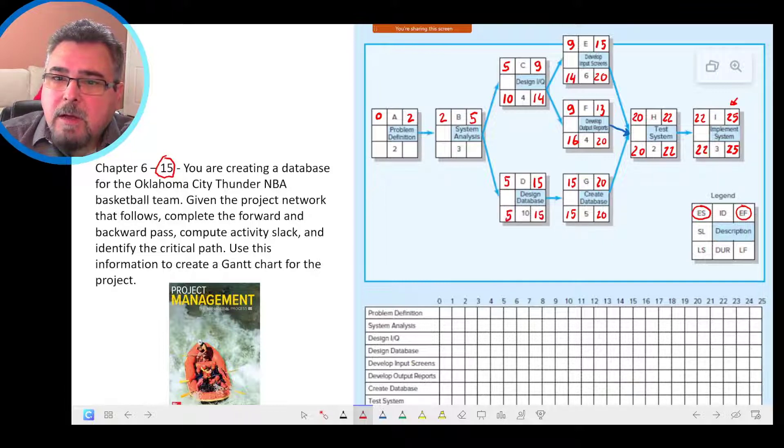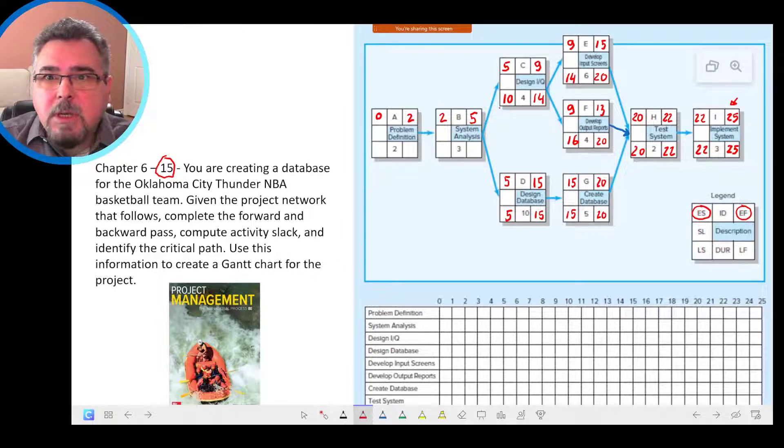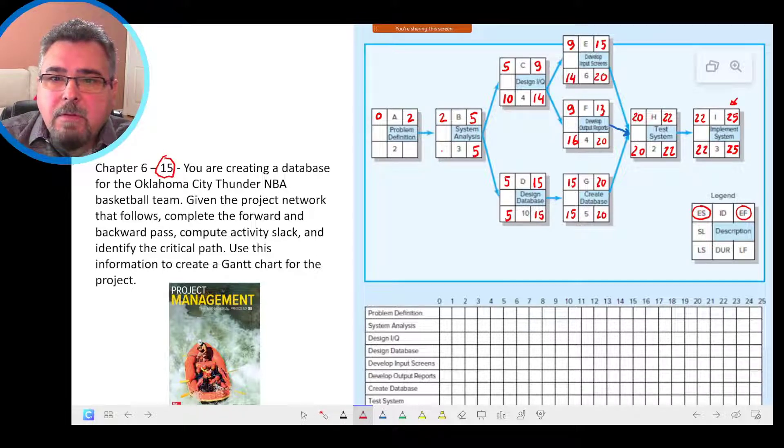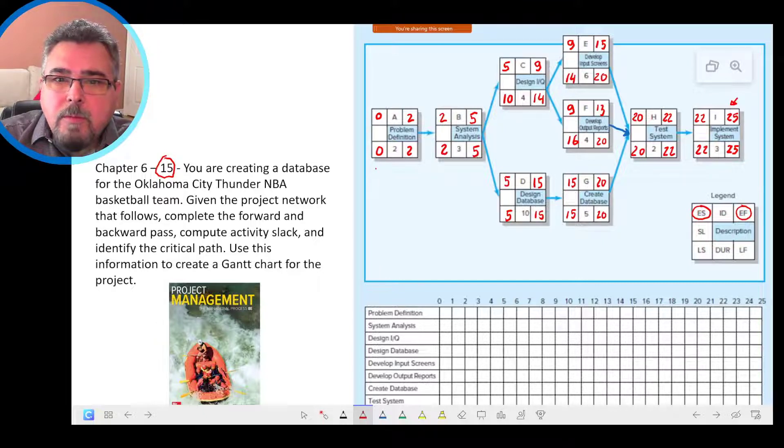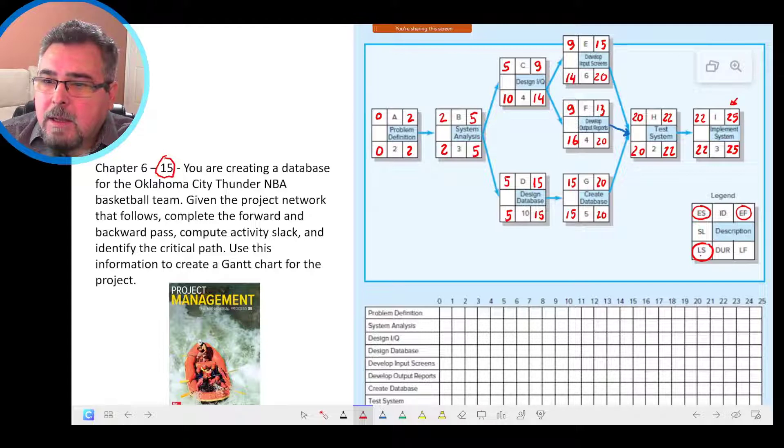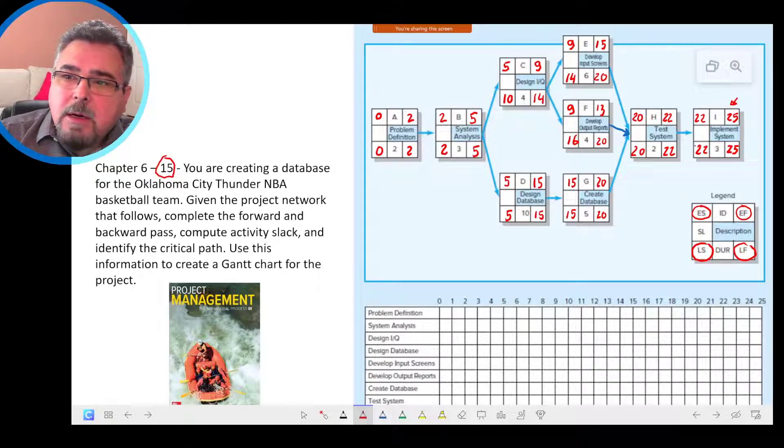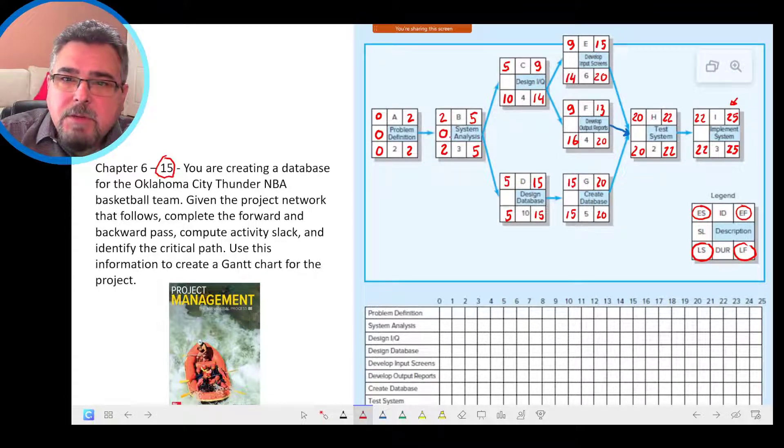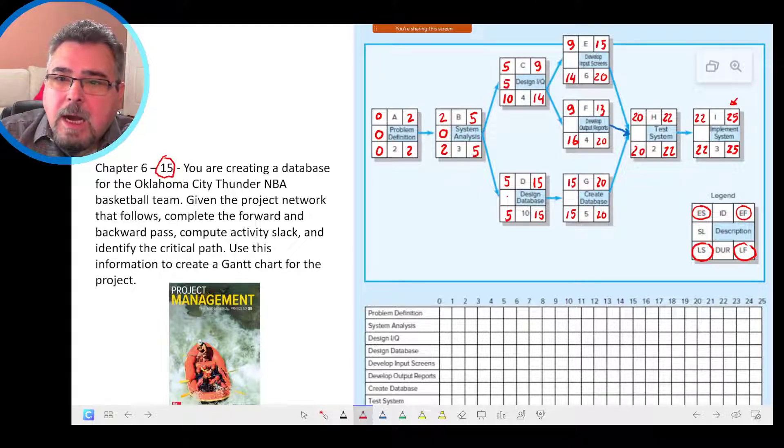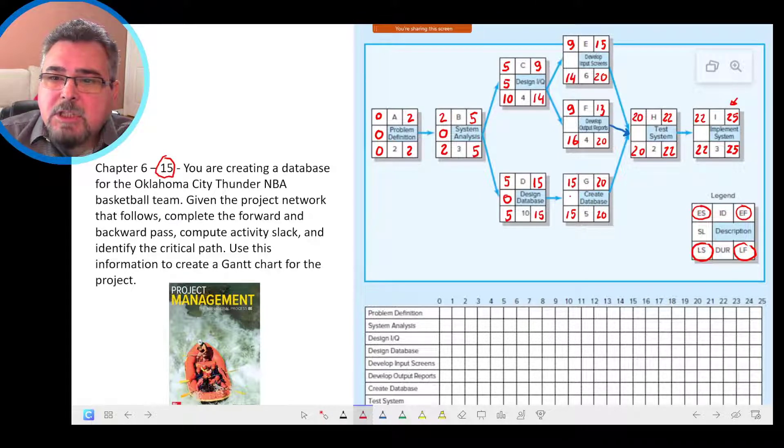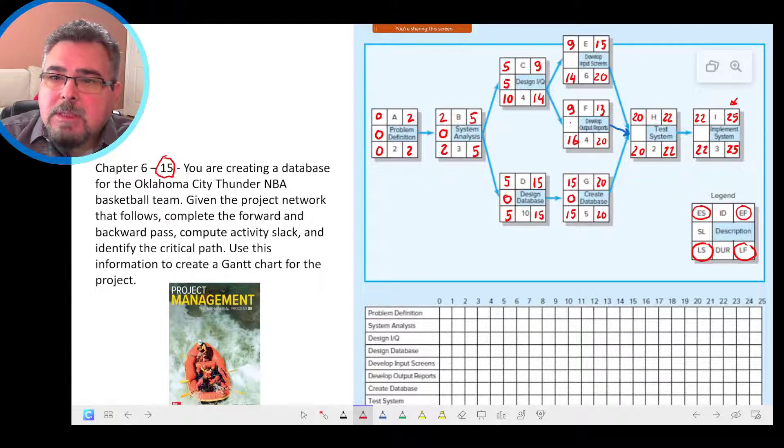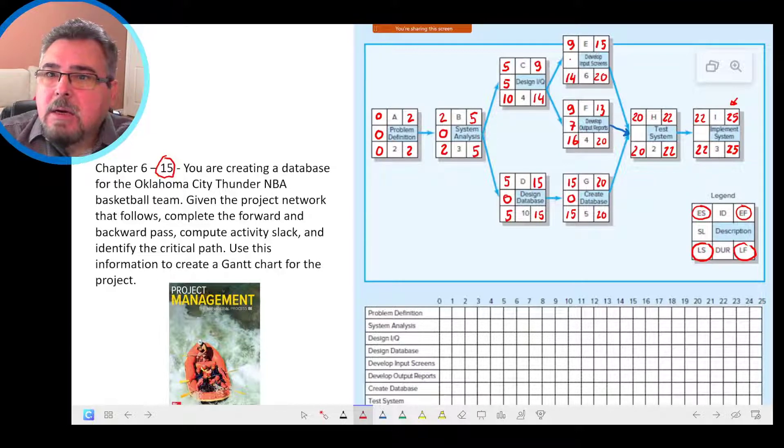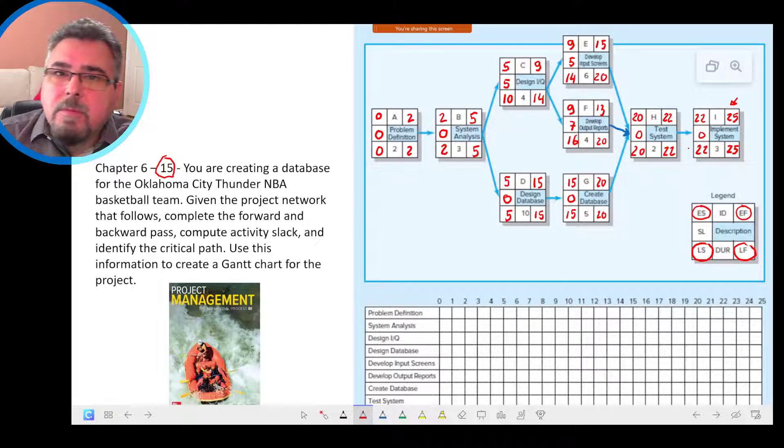Then we have 15 here. Minus 10, 5. Then we have two conditions for the late finish of activity B. So we have 10 and 5, because it's a backward path we have 5. 5 minus 3, 2. Moving 2, 0. So the backward path, we define the late start and the late finish for each activity. And here, let's put the slack. Activity A slack 0. Activity B slack 0. Activity C slack 5. Activity D slack 0. Activity F slack 7. Activity E slack 5, 0, 0.